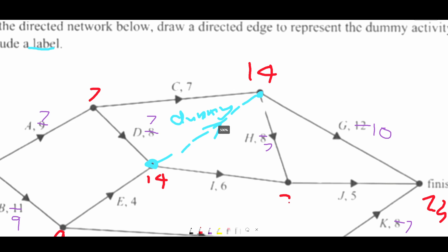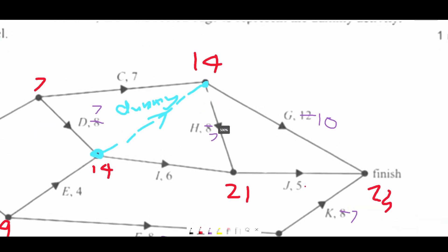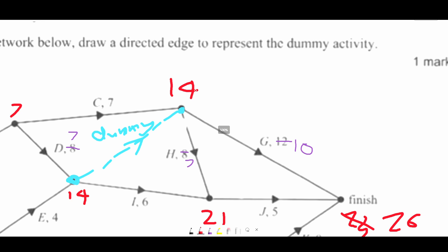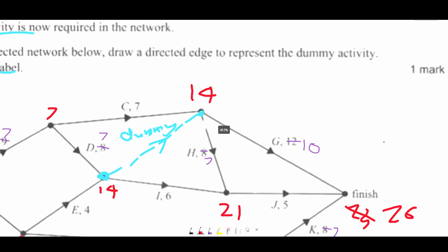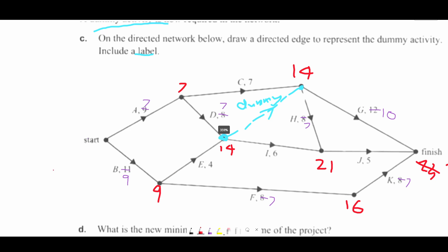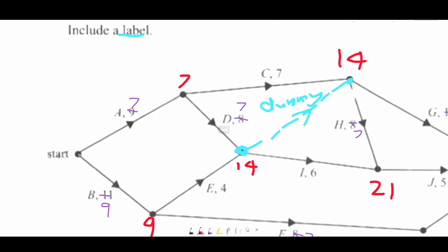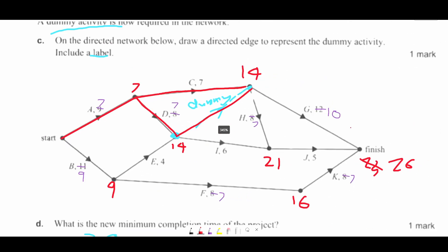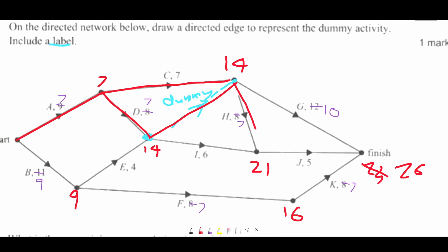14 plus seven is 21. 21 plus five is 26. So 26 is my higher number. 14 plus 10 is 24. So our critical path, we actually have more than one critical path here. So we're going to go up here. Seven. And then down here. And then we actually have these two pathways. And then we go down here. And here.